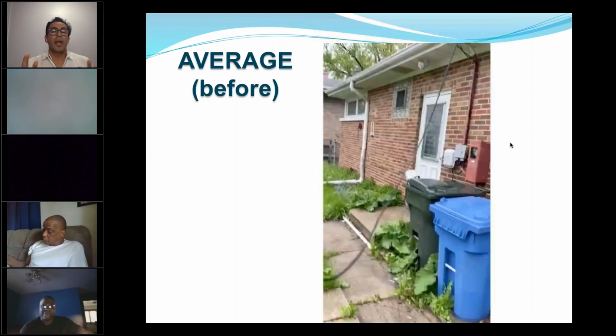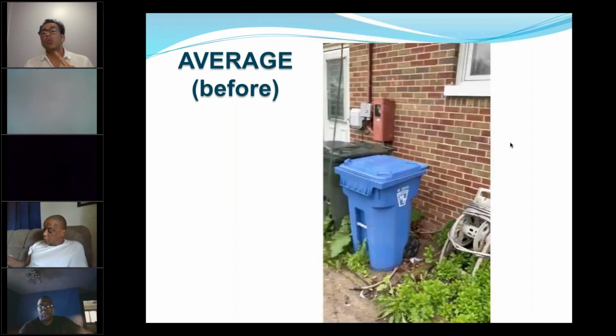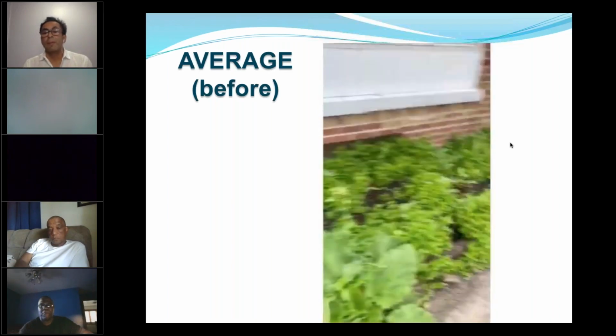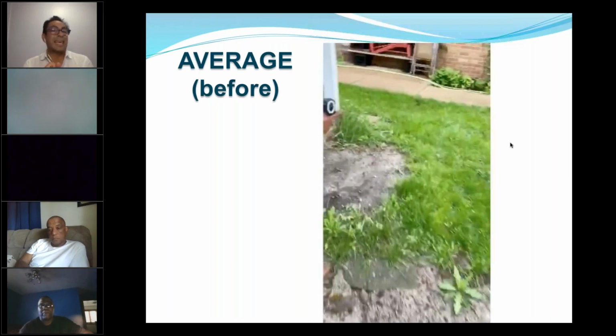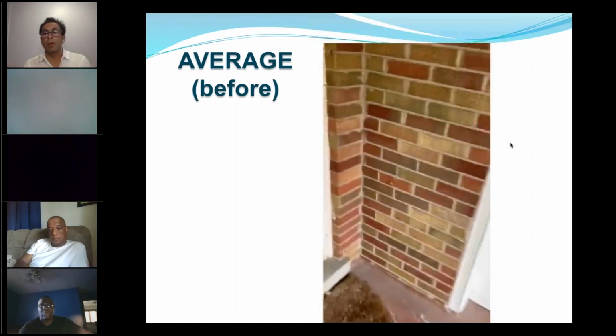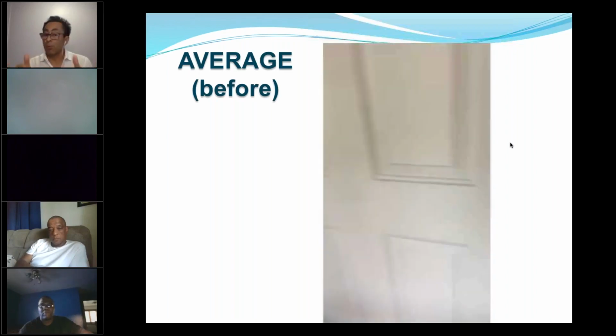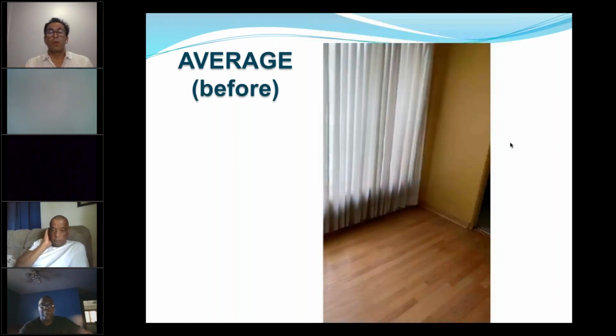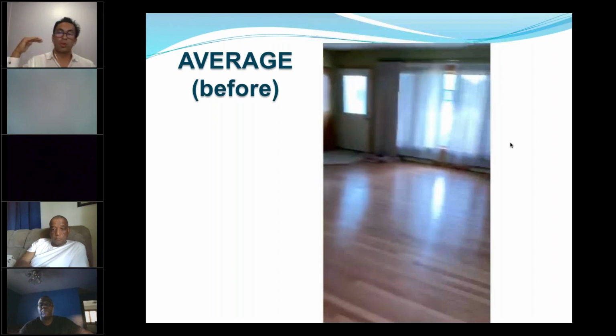Okay, so the next question is, do you need to upgrade the bathrooms? Do you need to upgrade the kitchen? In this case, the answer is yes. Therefore, it's not a light to medium. When you see this property from the video, it's going to look really good for you. But guess what? If you need to do kitchens and bathrooms, it goes into the average.